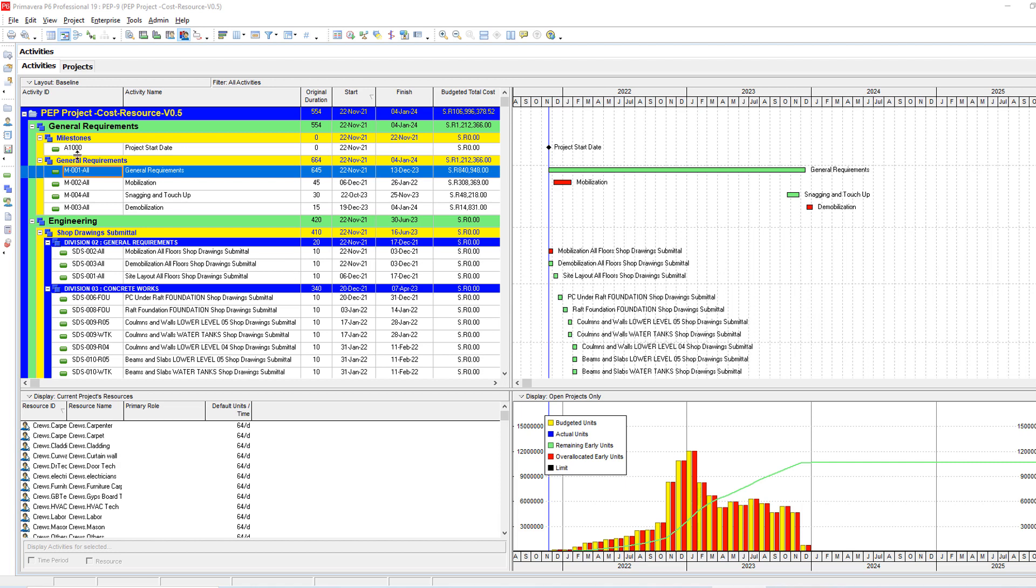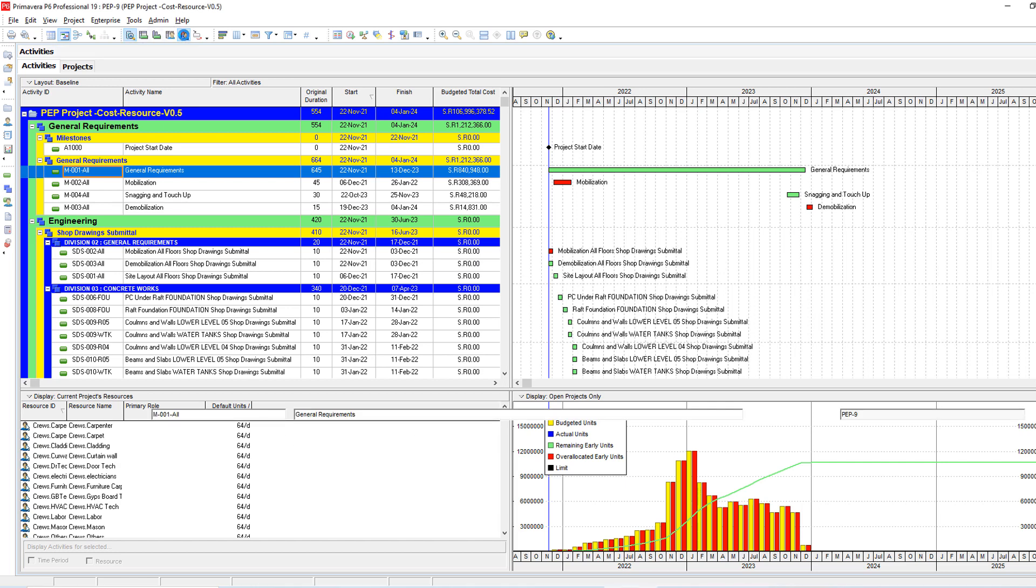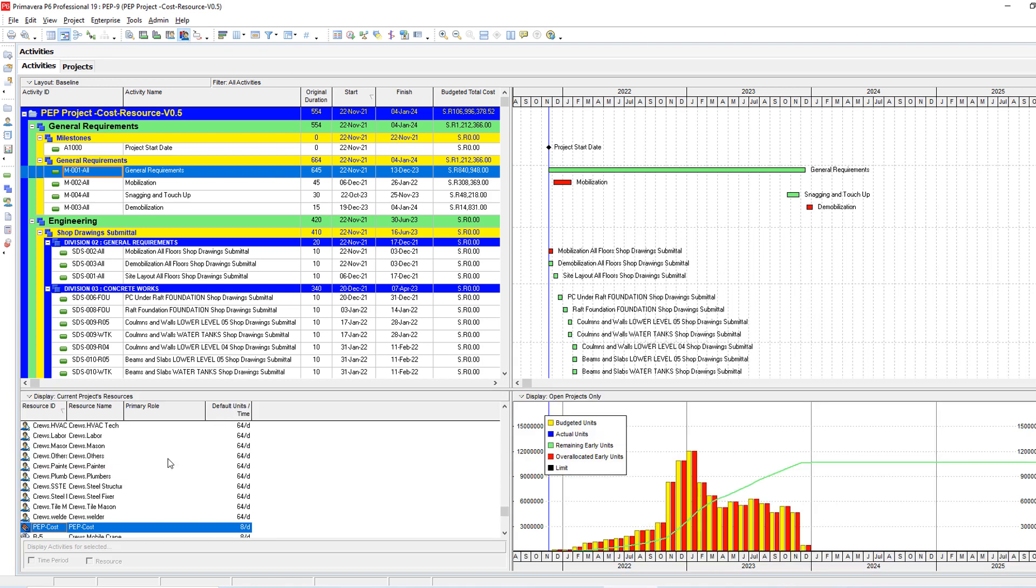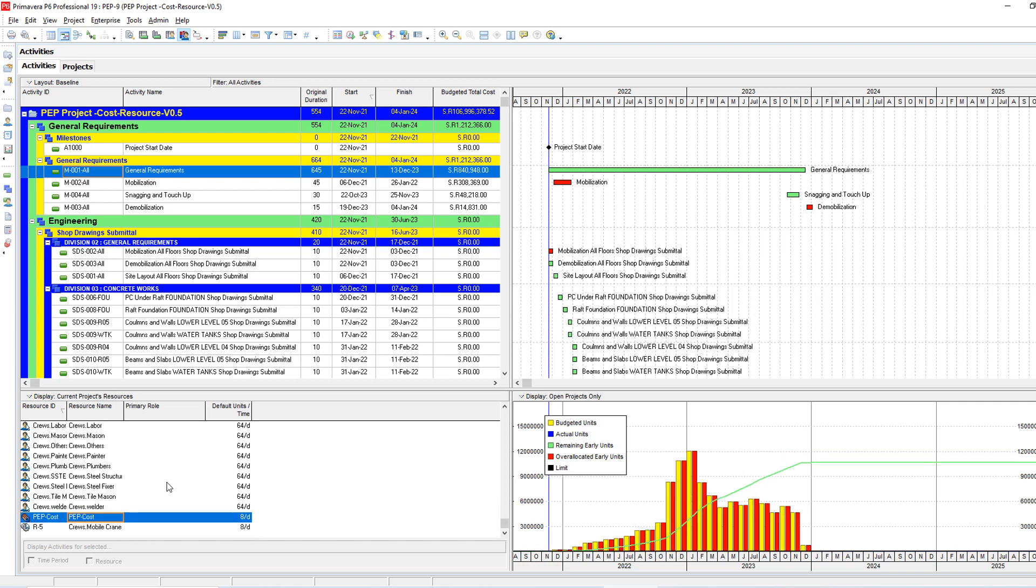The first thing is to show your activity start and finish date and budget cost. From here you will need to show from the resources. You need to show from resource usage profile to find which resource you are trying to make leveling for. In my case I have here this cost, the material resource representing my costs.